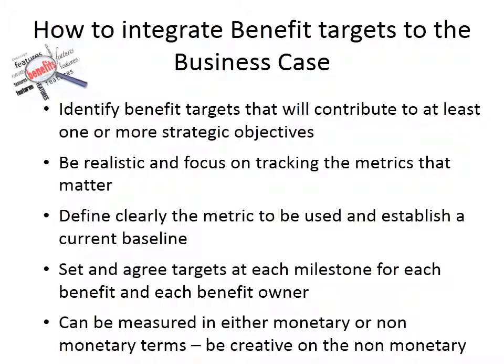If you really want to develop benefits and bring a good picture of the value you want to achieve, you will also have to use what I classify as non-monetary benefits. I'll give you some examples in the next slide, so stay with me on that. But what is a non-monetary benefit? It's a benefit that can be quantified, but not in financial terms. That could be anything like fewer customer complaints, productivity gain, greater accuracy, lower staff turnover, improved response time, anything that we often track in organizations, that really shows the bigger picture of the value that we can create with any initiative, any project.